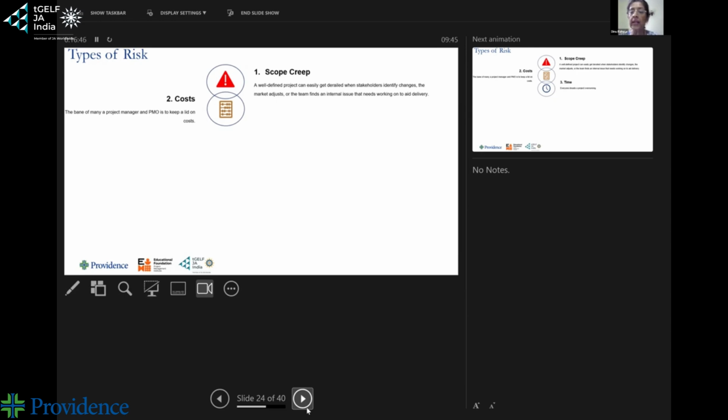That budget, or at least a good part of it, is approved by the finance team. And then, okay, yes, this is the budget that we have, and you are carrying on with the planning and execution, knowing that that is a particular budget. However, halfway through, you are told that, sorry, we need to cut your budget because some other project ran into extra budget and we have to now balance it out by taking it away from you. Too bad, sorry, your project is still ongoing. You're going to have to see how you can do with a lesser amount. So that can be a risk.